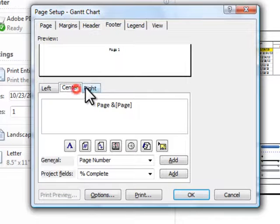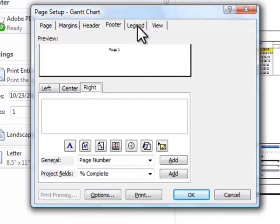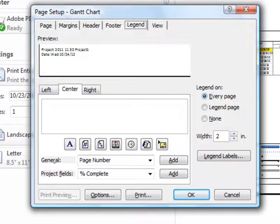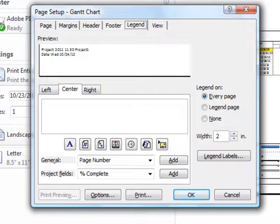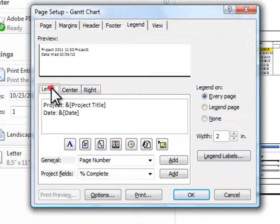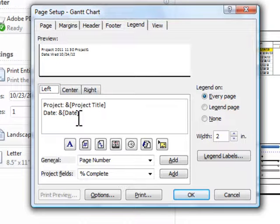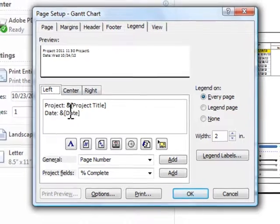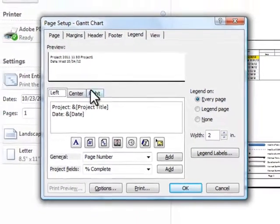You have those choices as well. And the legend. Now, the legend shows what all the colors and the tasks and the progress and summary bars and milestones mean. It gives you some information on those. As well as, in the left hand side of my legend, I have my project title and I have the date of the schedule.